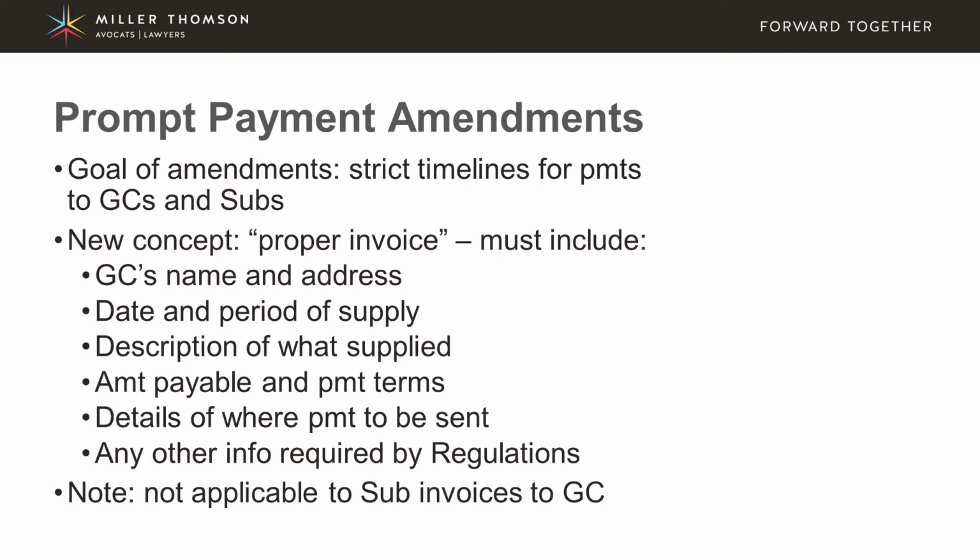Now, in order to do this, the amendments have introduced a new concept called a proper invoice. Now, it's very important to bear in mind that this concept of the proper invoice only applies with respect to general contractors. That could also be construction managers. It means any entity that has a direct contract with the owner only has to worry about this concept of proper invoice.